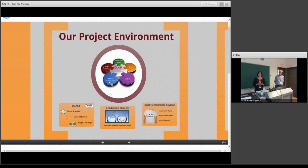We experienced within the project some delays due to the complexity of our business processes and a constantly changing landscape. So originally HR and payroll was scheduled to launch in late 2010. We did not go live until February 2012, which is just over a year after that. So in considering that timing, we had to consider the student launch dates and the overall capacity of the stakeholders within the university to absorb that amount of change. Because you have to remember, some stakeholders within your HR or payroll community may also be a finance user or a student user.